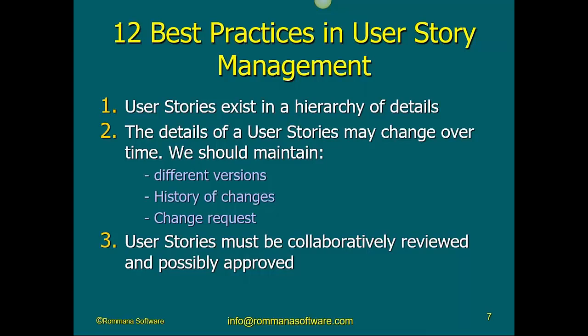I refuse to use user stories if I don't have a way to keep track of history. When someone suggests that a user story must change, then they need to submit a request. Right away, someone from the Agile community is going to say, oh, change request, you're taking us back to the waterfall model. Absolutely not. Who said that when we started dealing with Agile, the concept of a change request does not exist?